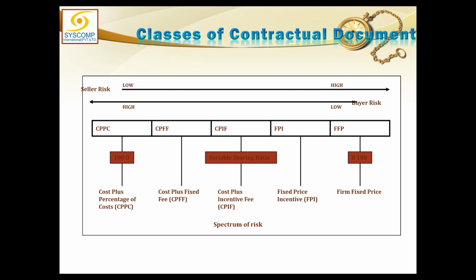So if this is the bid we have accepted and we have contracted, then we are already paying a premium of 2 crore rupees in it. Actual job is worth 4 crore and we are paying 6 crore. Therefore, we are paying 2 crore extra to the contractor.